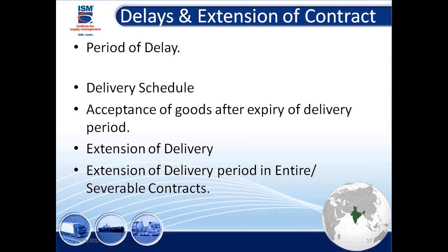And who pays for it? The supplier pays it. I get into this a little more in the next slides. Delivery schedules: they want to change it. If you agree, then there's no problem. But if you don't agree, the supplier has to pay some penalties on that. The word penalty has gone. In common law, the word penalty is not actually used. I know in normal usage we say penalty, but technically it has to be quantified: how much is the damage upfront, and then later on, if it happens, the supplier has to pay.